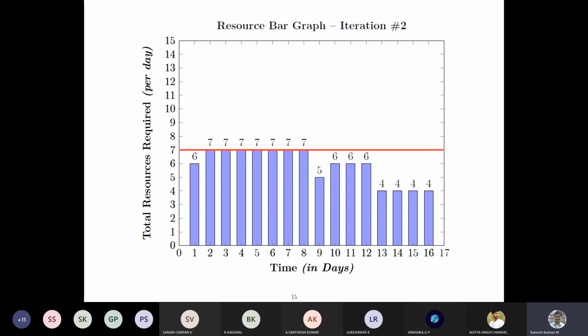And this is typically the ordinary methodology of leveling the resources. But the problem is, are we convinced that this is optimum? Even though we have leveled this, it may not be optimum. Even then, some activities have 4 resources, some have 6, only one has 5, and some have 7 resources, and this profile is not balanced. It seems like level, but the profile is not balanced.